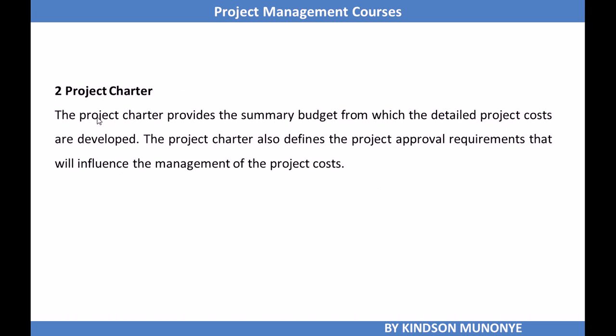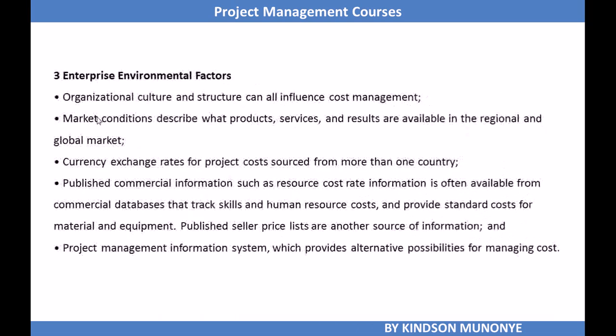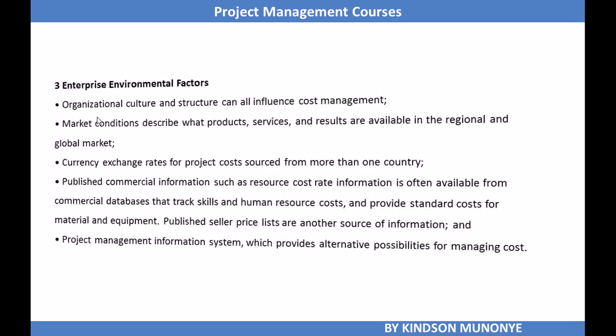We need the project charter because it provides a summary budget from which the detailed project costs will be developed. The project charter also defines the project approval requirements that will influence the management of the project costs. Enterprise environmental factors like organizational cultures, market conditions, currency exchange rates, and published commercial information can affect the plan cost management process.